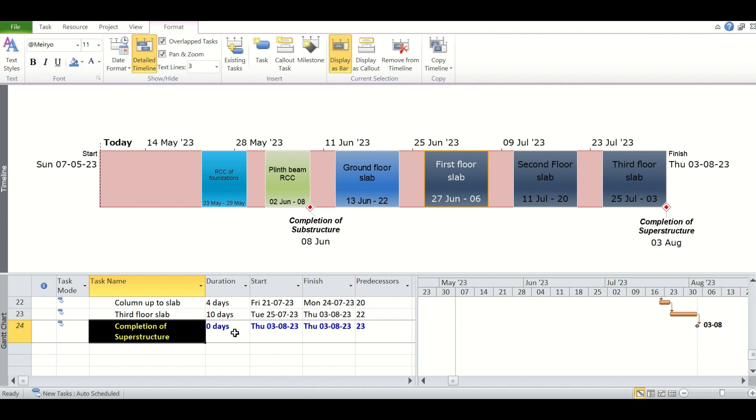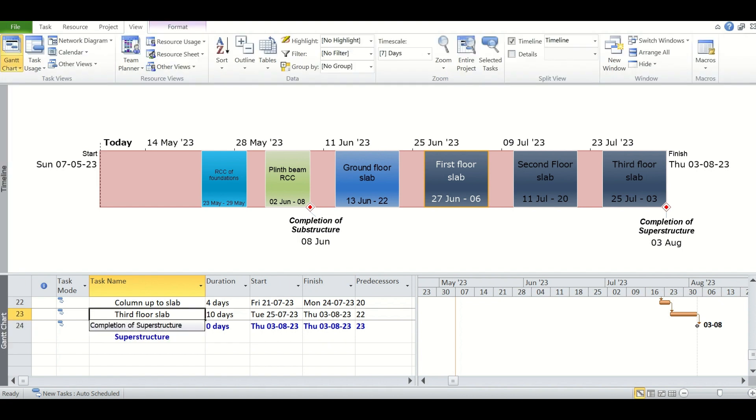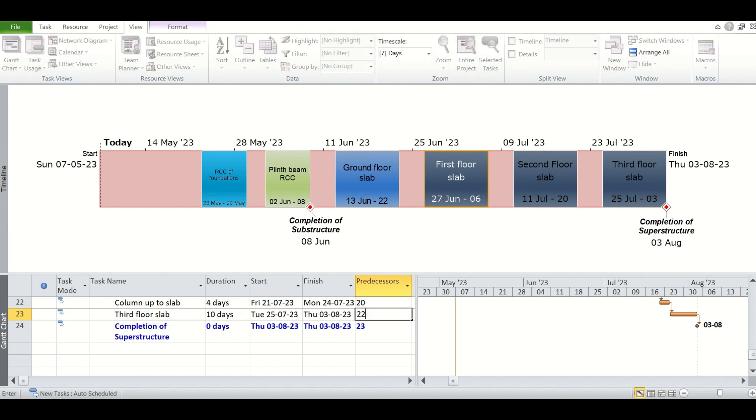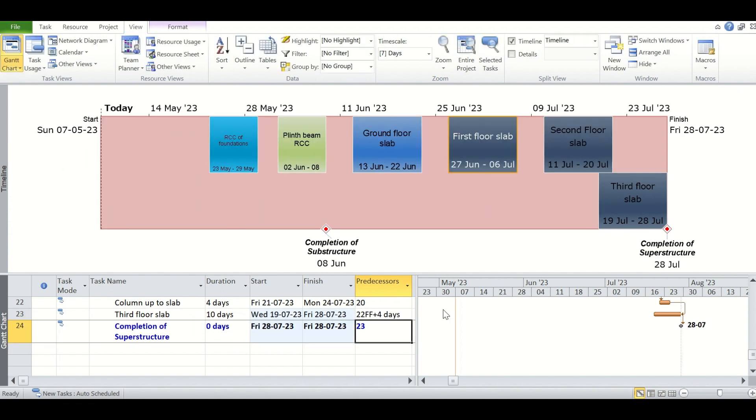For experiment, we are showing one thing: if two tasks are simultaneously progressing, then how it should look on the timeline. For example, make this third floor slab with a different relationship, 22 FF plus 4. So tasks 22 and 23 will be progressing simultaneously for a certain period.